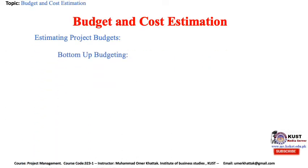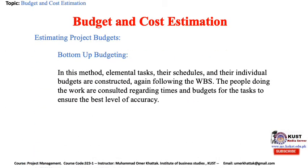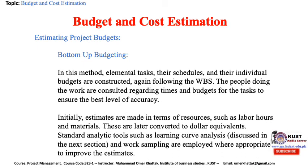In bottom-up budgeting, elemental tasks, their schedules, and their individual budgets are constructed following the work breakdown structure. The people doing the work are consulted regarding times and budgets for the tasks to ensure the best level of accuracy. Initially, estimates are made in terms of resources such as labor hours and materials, which are later converted to dollar equivalents. Standard analytic tools such as learning curve analysis and work sampling are employed where appropriate to improve the estimates.